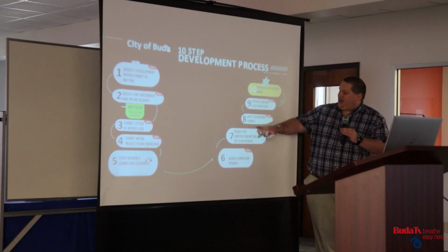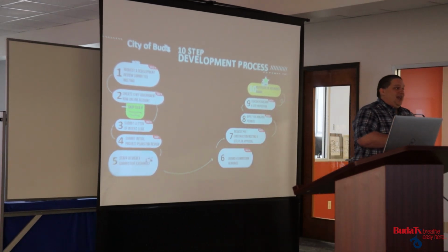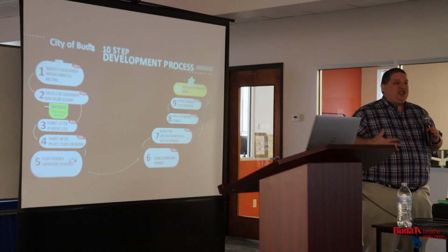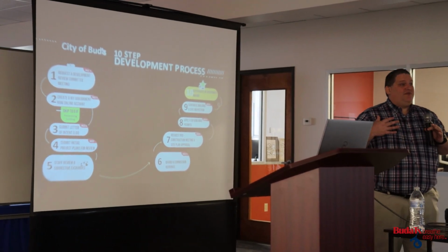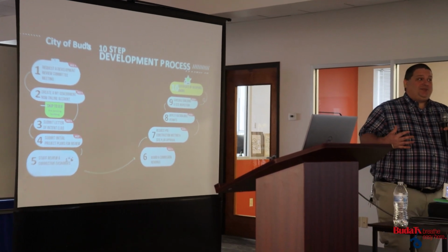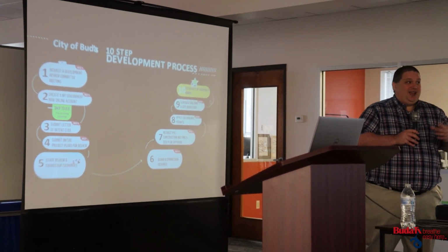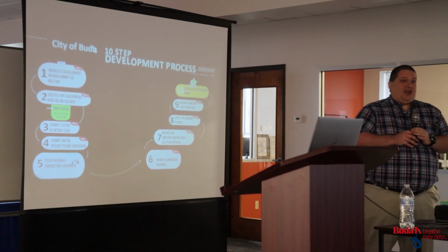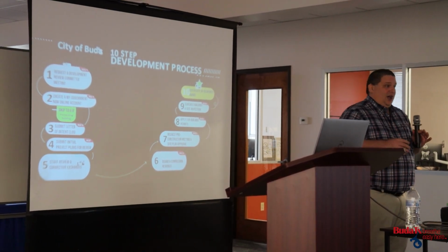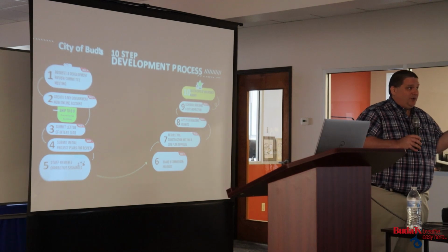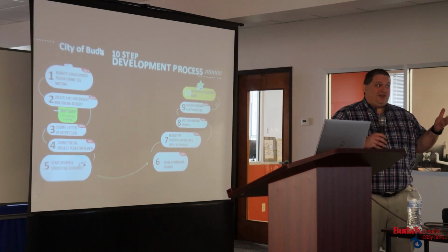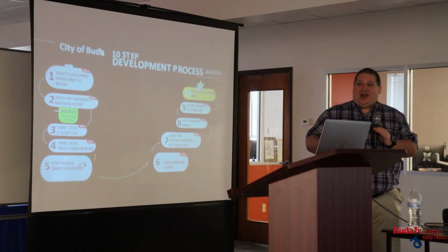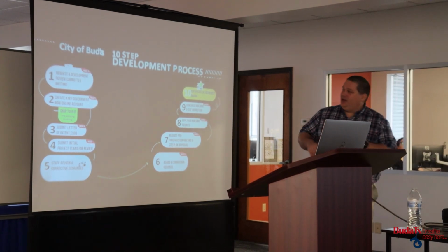Now, this step right here, number 8, is usually much quicker because a lot of the difficulty on sites is your subdivision of property, your development of the site itself. The buildings themselves, a lot of times it comes down to, is the use allowed and does it meet building code? And our building official is right now very, very quick at doing building permits. So usually, if your plans all meet code, you're looking at close to a week turnaround. It's very, very quick at that point.